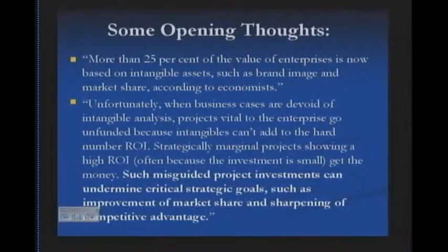Unfortunately, when business cases are devoid of intangible analysis, projects vital to the enterprise go unfunded. In other words, if we underestimate the potential benefit of an intangible because we don't want to risk overestimating it, we already talked about why that's a bad idea, but if we grossly underestimate that benefit, then we may not have enough benefit to get the IT project funded. Remember, it's competing with other projects throughout the rest of the corporation for funding.